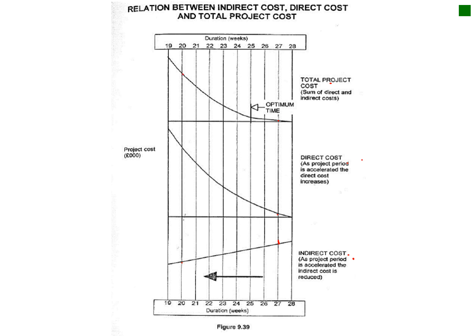Your indirect cost has a constant slope. That's like your P's and G's, your daily or your monthly costs. Your direct cost is your more plant, like we highlighted earlier, which escalates if you reduce the time needed. Okay, so that is basically the concept. So we're going to look at that now, and then try and plot this on a graph.